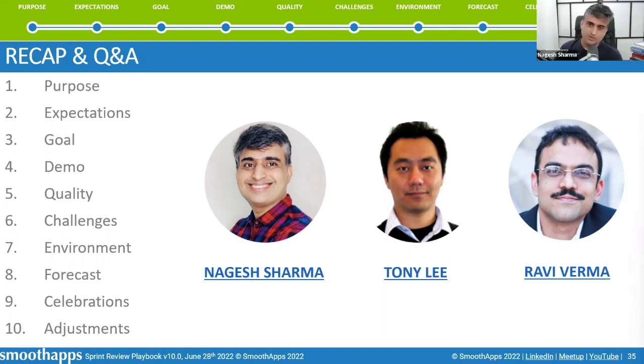Sure, sure. So how do you deal with the feedback, especially when you have lots of feedback and you are not sure what's valuable and what's not valuable? I've used certain techniques to deal with such situations. Since this webinar is also about facilitation techniques, I'm going to definitely talk about that. So one, we do not funnel out any feedback in the beginning. We have a technique called Max Specs in Liberating Structures. So everything is valid and everything is valuable, and this is like a funnel, and then there are certain things which get filtered, which is more like the Min Specs. That means what is absolutely important for us in the near term, in the midterm, and in the future.